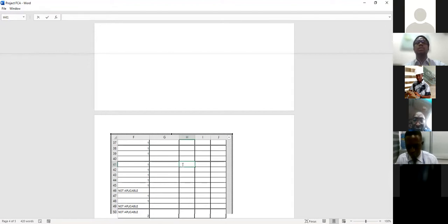That original one, I'm sure there's, because that's the spreadsheet you are using, isn't it? The spreadsheet you started collecting your data inside. If there's no space for pictures, and this is important for everybody, add a column for pictures. There have to be pictures. Conditional assessment cannot be done without pictures. There's no chance they would accept any submission without pictures.